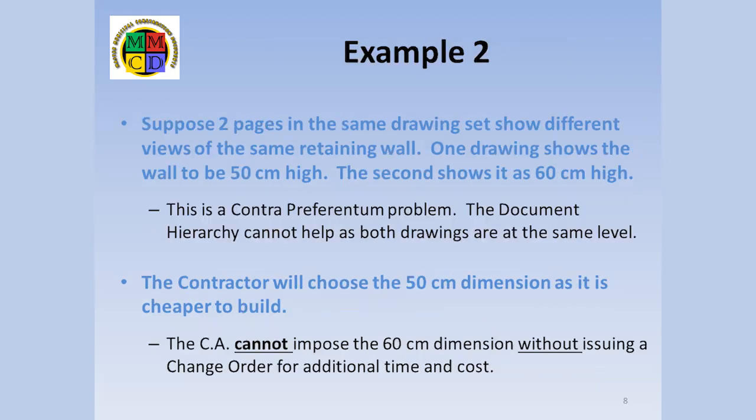Here's an example. Suppose two pages in the same drawing set show different views of the same retaining wall. One drawing dimensions the wall as 50 cm high. The second shows elevations of the top and bottom of the wall, with the difference being 60 cm. This is a contra preferentum problem. The document hierarchy cannot help, as both drawings are at the same level. The contractor will choose the 50 cm dimension, as it is cheaper to build. The CA cannot impose the 60 cm dimension without issuing a change order for additional cost and possibly time.